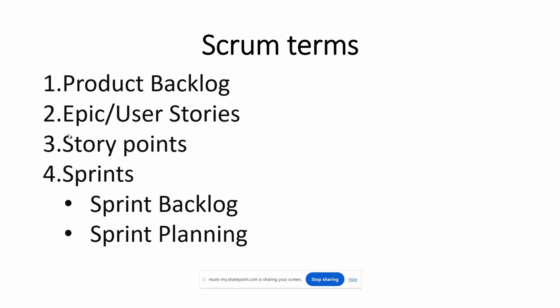All of these things come into what is sprints, and we're going to get into sprints a little bit more, but a sprint is essentially what is used to time box a project in the amount of work that will be done in a certain period of time. Typically, sprints are 1 to 4 weeks. 2 to 3 weeks is very common, and actually the most common that I've used in my career. During that 2 to 3 week period, we agree on how many user stories we can complete, and then at the end of that sprint, we actually deliver those user stories to the business.